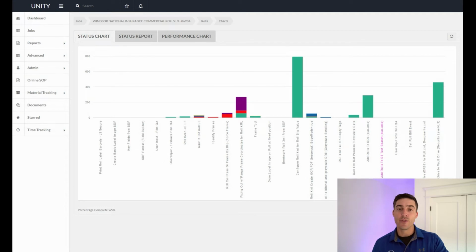Now, step 5 is the milestone. Once that project process flow is created, our senior project manager is going to run what we call our milestone 1 proof of concept, which is basically taking your project process flow, running a small batch of your microfiche through the entire process flow. That could be 10 steps, it could be 50 steps, depending on how complex your project is. And we're gonna run that small batch and basically get an end result as if we were delivering the real project. So what this does for us is we get to see if there are any anomalies in the project, if something weird pops up, and if it matches the expectations that were set by our sales rep.